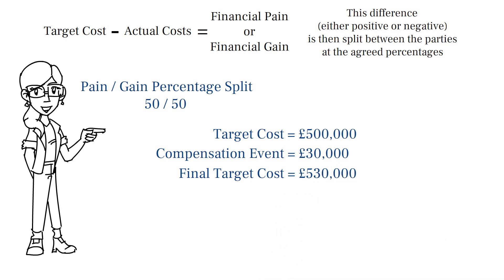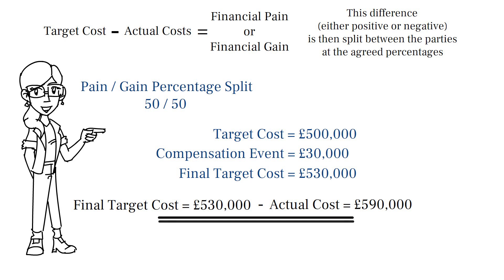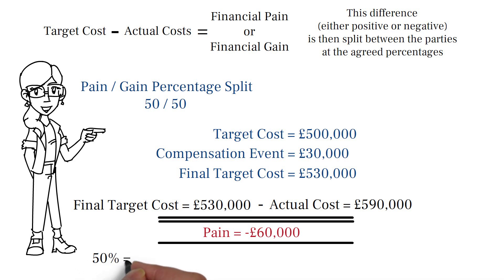There were other complications and issues that did not constitute a compensation event, and the final actual costs assessed by the client amounted to £590,000. As the actual costs are over the final target cost, including the compensation events, the financial pain incurred must be calculated. To do this, you minus the actual cost from the final target cost, leaving £60,000. The 50-50 percentage is then applied — 50% of £60,000 is £30,000.